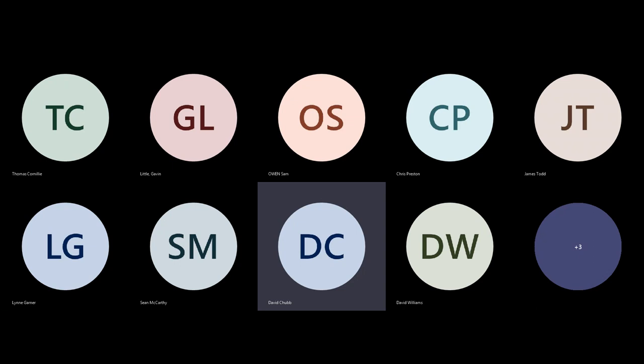Because the railway less so, because we control a lot of our own data. We know, in theory, what is in our land. If you were a housing developer, you don't know what's there. The whole point in the PSIP becomes far more important at that point, the pre-construction information pack, yeah.